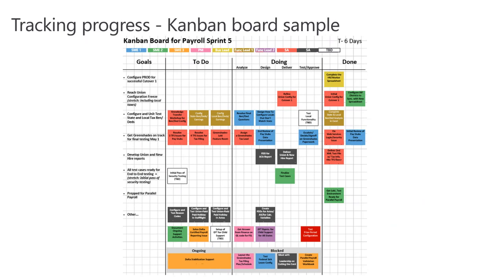They're not making good progress. They're not able to work on 4 things simultaneously. I'm going to take away 3 of those and put them in the to-do. I'm going to say finish this one, then I'll give you the next one, then the next one, and then the next one. I'll feed you them in sequence so we can get the right level of progress, right?